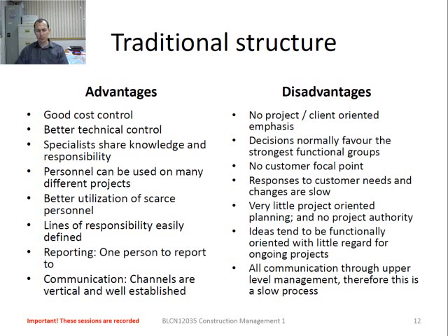From a democratic point of view, a traditional structure is too autocratic to function, and it's difficult to get that team spirit going in terms of a traditional structure. So you have to keep that in mind when you decide on your structure. Typically, you'll see the older type family businesses, construction companies in Australia, will run with a traditional structure up to a certain point. When the company becomes too big, it will shift into a matrix. Right? So look out for the signs, look out for the changes.